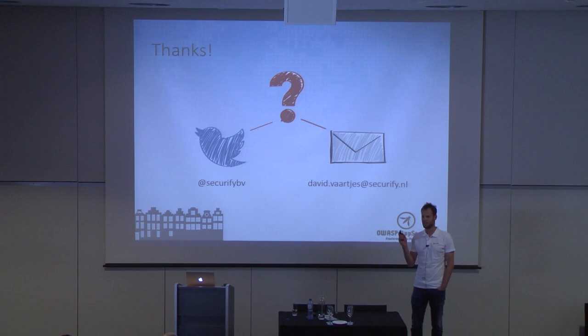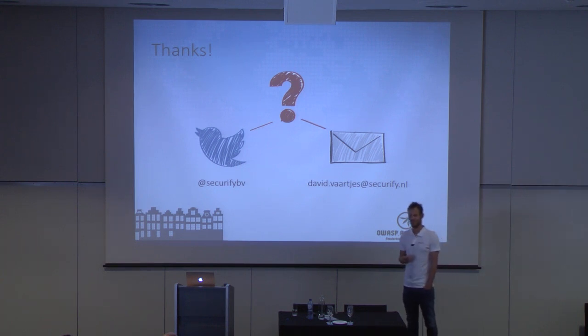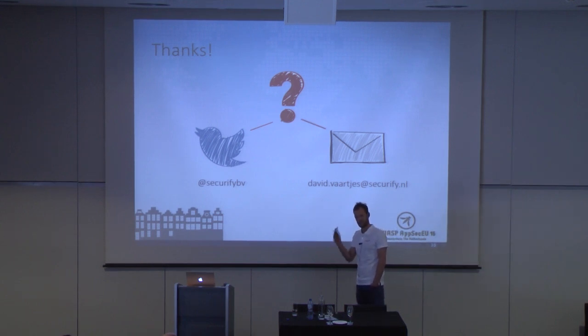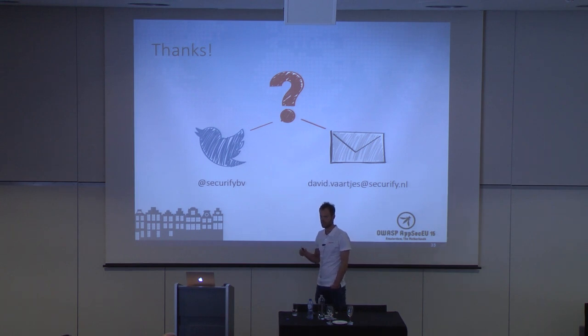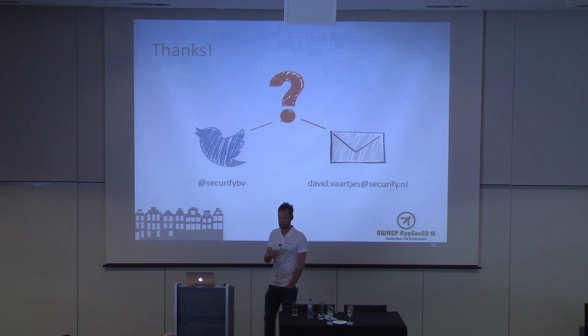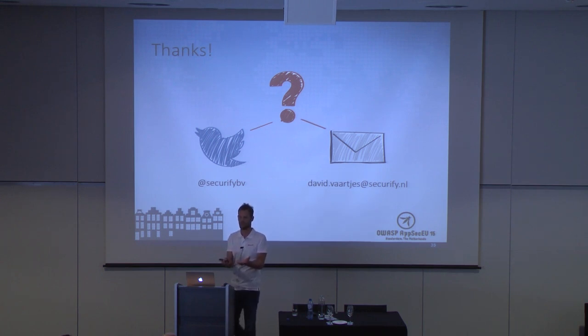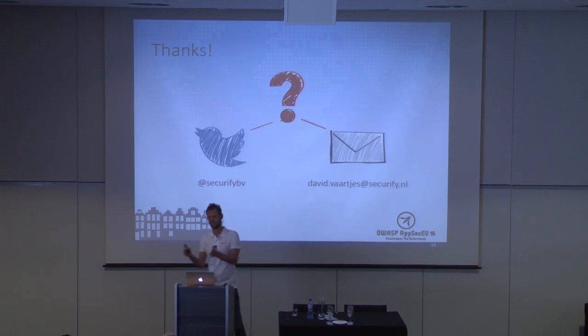Yeah, so you can do your threat modeling in the grooming, but you can even be earlier than that. At some point we also just ran through the backlog ourselves to work ahead. If we saw things that might introduce issues, then before the team even starts discussing it in their grooming, we got together with architects to get it right already, so the team wasn't working on the juicy story yet.